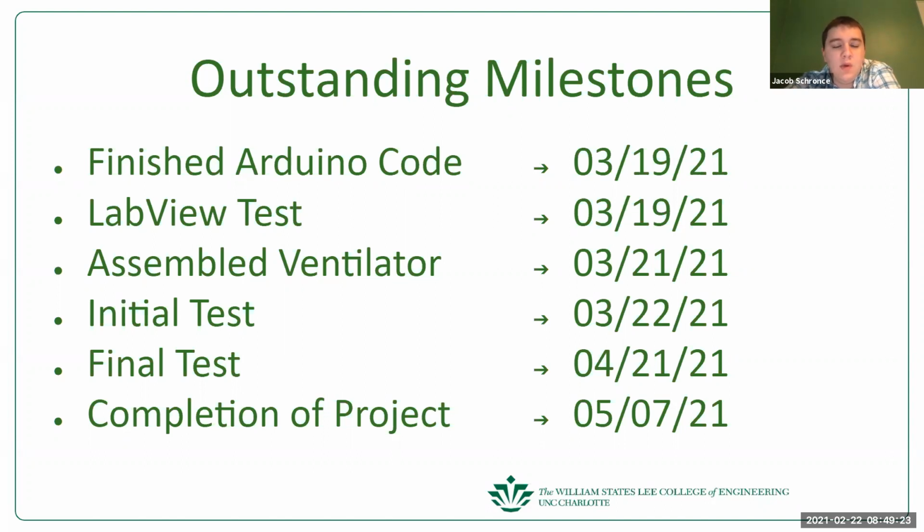And then we want to have the ventilator actually assembled and ready to go by the 21st of next month, with the first test of the ventilator being the next day. Then we're going to leave a month for troubleshooting and getting the ventilator working as needed. The plan is by April 21st to have the final test happen and everything be good and ready to go. Then we will complete the project with all the requirements by May 7th, which I think is also the day of the expo.